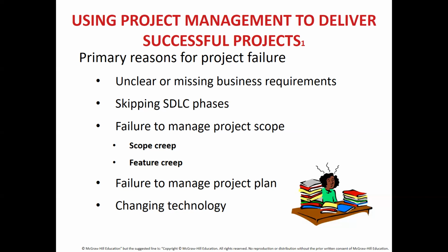Okay. Now, sometimes this also happens. The software doesn't change, but the hardware changes. For instance, if you were supposed to implement a software and you have purchased the hardware beforehand. So by the time you finish within 4 or 5 years time, your new ERP or the new software is not able to be compatible with the hardware that you've actually bought. So that becomes a major issue again.